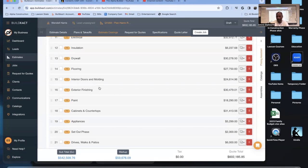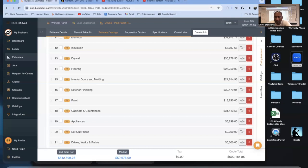If I just use the assembly method — where I look at it and say this structure is going to cost roughly this per square foot — it's not going to be detailed and catered to those particular plans, which is the problem you're going to run into.